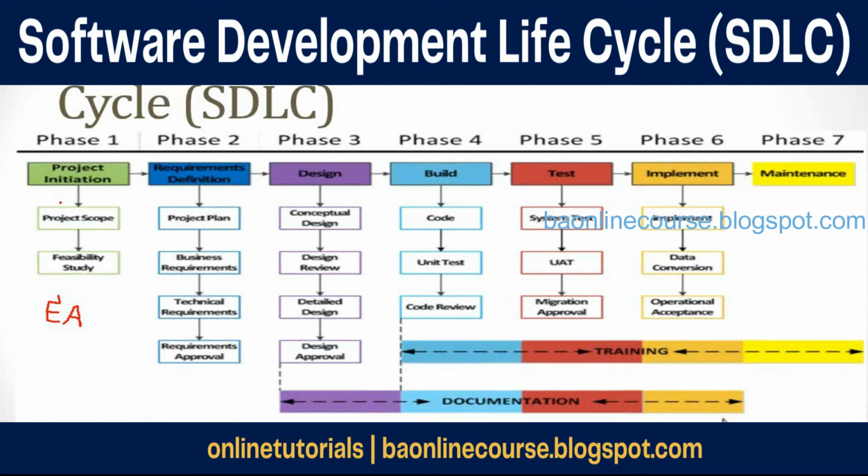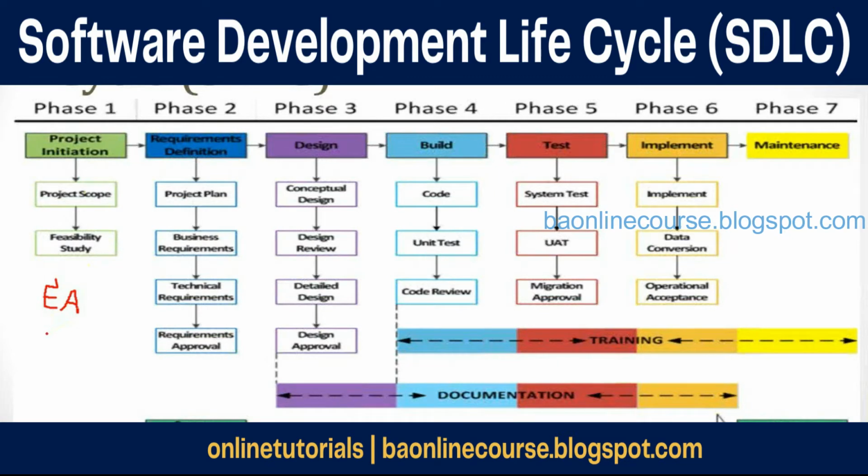Now after this phase, the output or the deliverable coming out of this is that you would have budgets allocated to the project. Okay. Now once the budgets are allocated, then the team is onboarded. So there would be an architect, there will be a business analyst, there will be a project manager, and the first step that they would do as part of the project is they would create a detailed project plan. Right. So there would be planning activities, and you would contribute to the requirements planning.